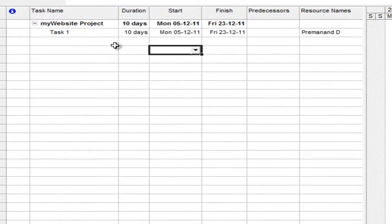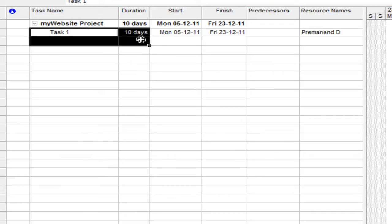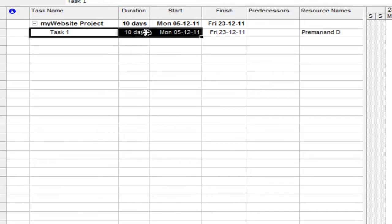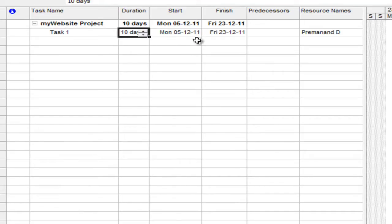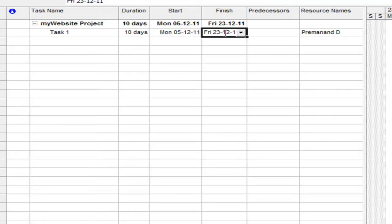Can you see this example where Task 1 is a 10 days effort, starts on 5th of December and ends on 23rd of December because the week starting the 12th is a public holiday and no one is working on that period. So this task is delayed by a week because of that reason.